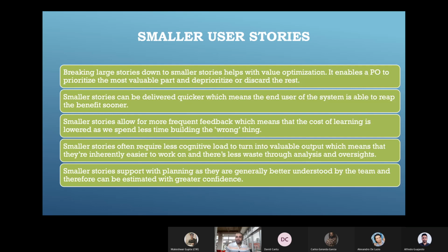So the best practice is, if as a developer you get any story which is big and can be broken down further, go back to the PO and ask, can we break down this story? As a PO, if you feel okay I have written it but the team estimate is more, it means it can be broken down further. So the objective is always to have smaller chunks of code, smaller things to deliver as shippable.